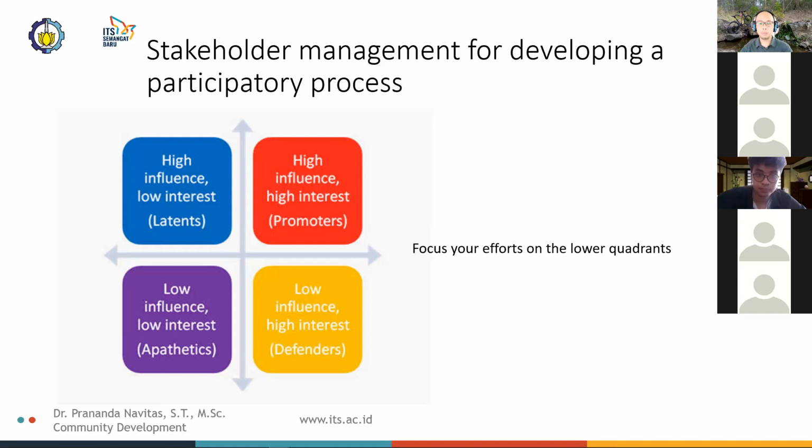The more people, groups, institutions, and organizations with influence that are involved, the greater the chances for success. The task with latents is to convince them that they are true stakeholders and that the effort will benefit them either directly or indirectly. If it's not direct, the benefit in question may be as removed from them as increasing the community's tax base by making more people employable, for example, or creating a more just community by, let's say, eliminating discrimination.